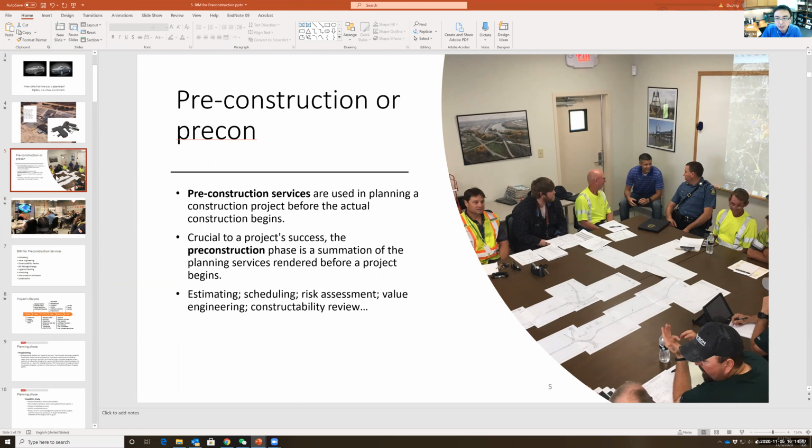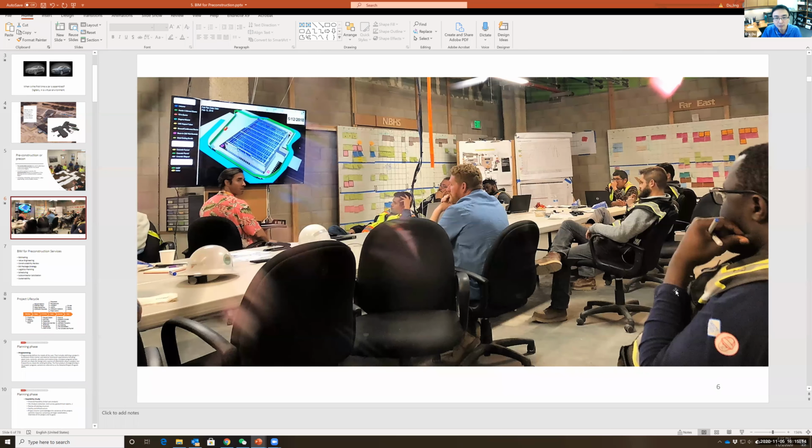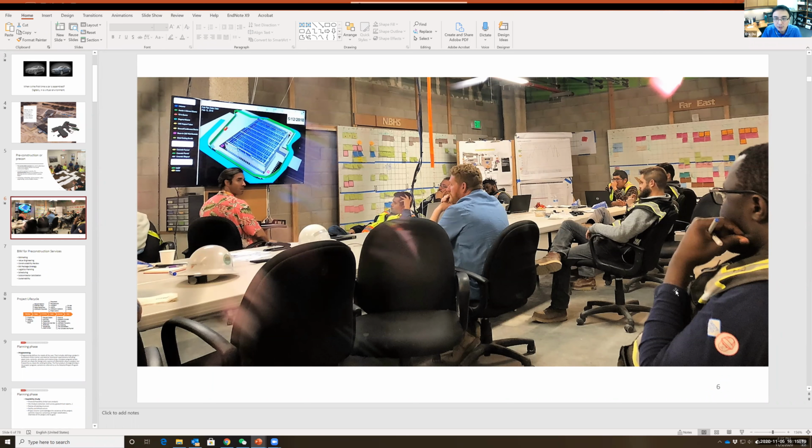A typical thing you see for construction companies or general contractors looks like this: meetings after meetings, talking about a 3-week look-ahead schedule, talking about what we call the weekly detailed planning to decide the head count for each of the activities, with some bar charts on the wall, some site maps on the wall, and people trying to figure out the best location for the trailers, how to move the tower crane, and making phone calls to different suppliers to make sure they will be delivered on time to the job site. That is the life of a construction company.